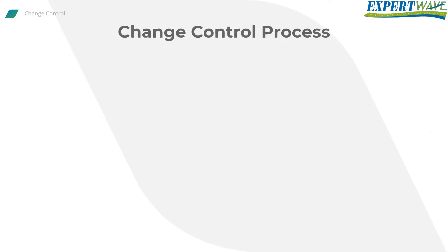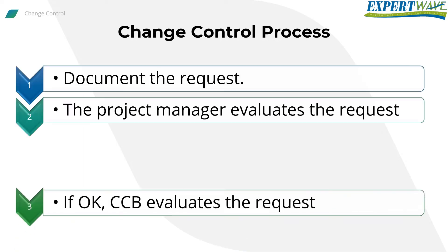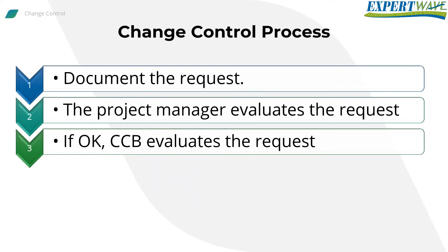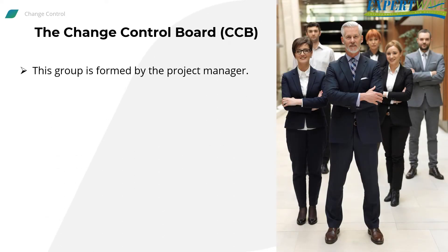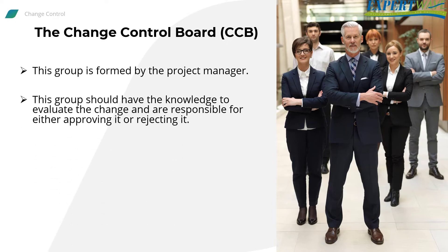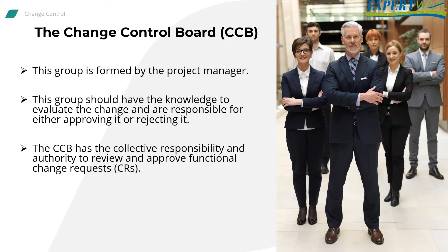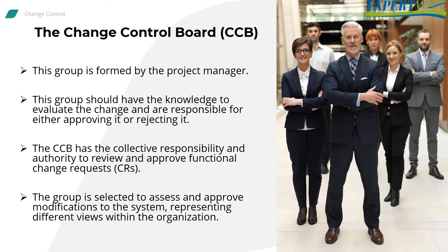Back to our change control system — if the change is legitimate from the project manager's point of view, the change request should go through a group of people to evaluate it. This group is usually called the Change Control Board, or CCB, and some companies call it the Configuration Control Board. It is formed by the project manager at the beginning of the project and consists of selected stakeholder members. The CCB has the collective responsibility and authority to review and approve functional change requests.